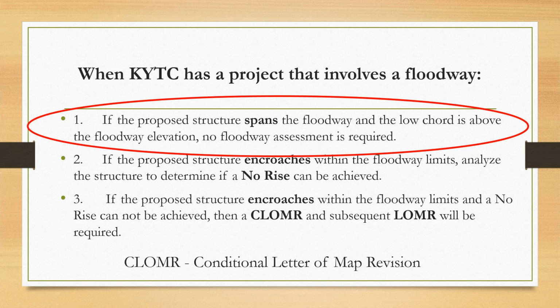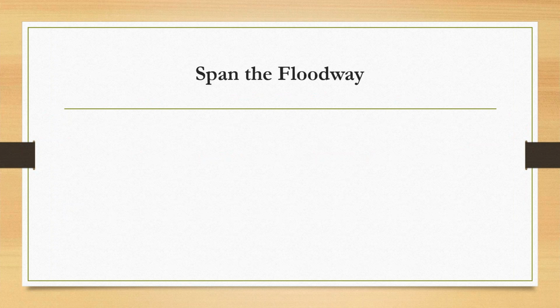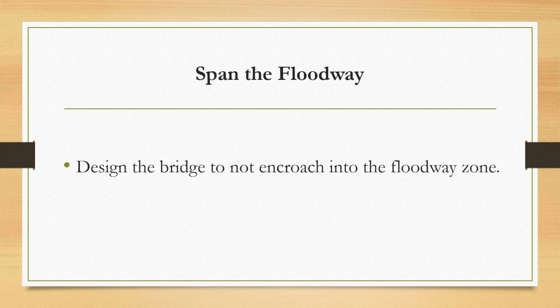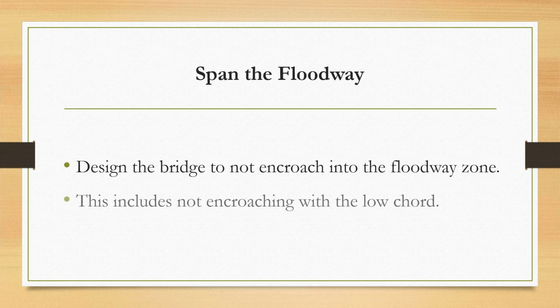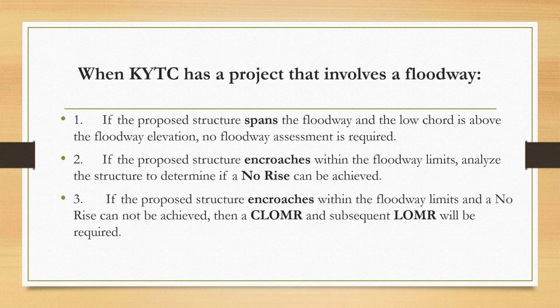All right, the first thing that we're going to talk about is if we have a project across a floodway and we plan to span the floodway. Well, this is kind of the simplest one, and I think this is where I see transportation always kind of go. They want to design the bridge not to encroach in the floodway zone, and they want to make sure that the low chord does not hit the 100-year flood elevation. So that's going to be our number one approach, and hopefully we can make that happen without spending too much of the funds.